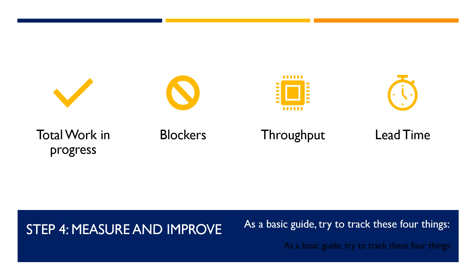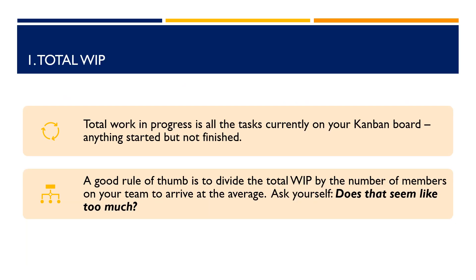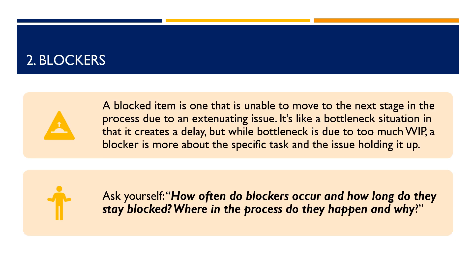Total work in progress is all the tasks currently on your Kanban board — anything started but not finished. A good rule of thumb is to divide the total WIP by the number of members on your team to arrive at the average, then ask yourself: does that seem like too much? A blocked item is one that is unable to move to the next stage in the process due to an extenuating issue. It's like a bottleneck situation in that it creates a delay, but while a bottleneck is due to too much WIP, a blocker is more about the specific task and the issue holding it up. Ask yourself: how often do blockers occur and how long do they stay blocked? Where in the process do they happen and why?